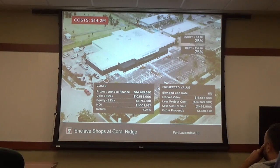And last question, during the construction phase, there was someone on your team that was going to check the site like 3 times a week? Yes, that was myself. And do the pay apps? That was myself, yeah. I'll approve the pay apps, I'll approve the construction loan draw, and make sure that we are submitting everything to the lender. Now, one of the things the lender does is when we submit a pay app and a loan draw to them, they send an independent inspector out to make sure that what we're asking to get paid, we've actually done the work. But me, as the owner's rep, I would make sure that everything was getting done on my side for the owner.